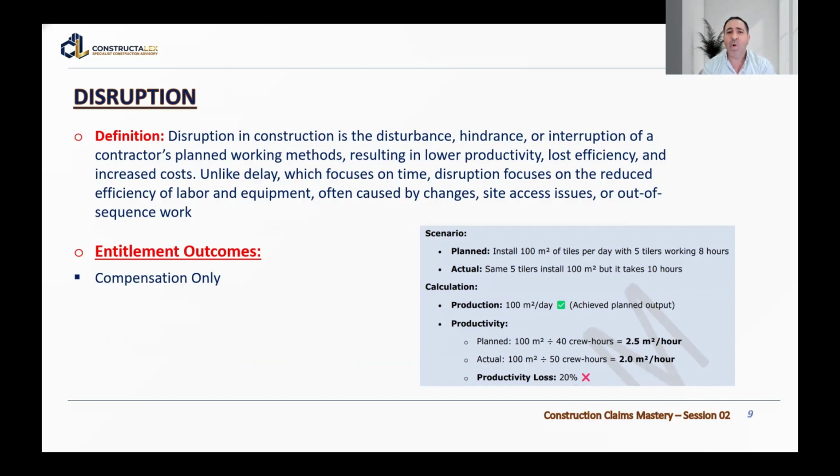Unlike delay, which focuses on time, disruption focuses on reduced efficiency of labor and equipment, often caused by changes, site access issues, or out of sequence work.